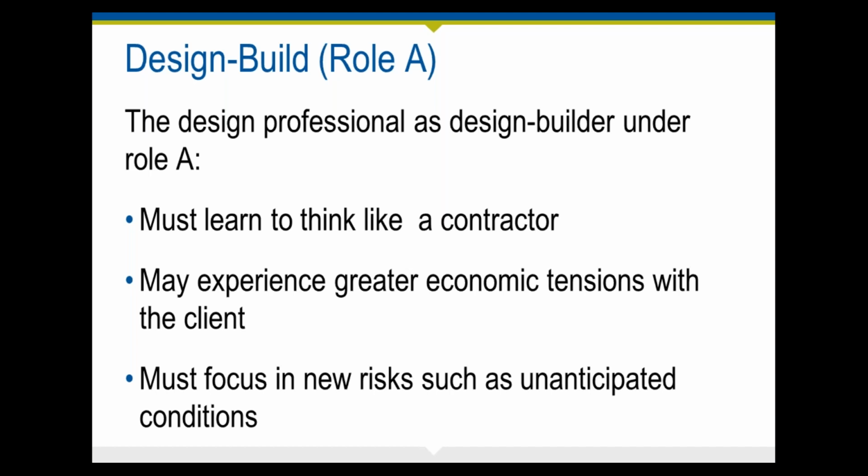You should also focus on certain risks such as time and cost risks associated with encountering concealed or unanticipated surface conditions. This is a constant consideration of contractors, but traditionally it has not been a subject of business concern really for the design professional, beyond making sure that the survey reflects what is out there and designing a solution based on the information available to you.